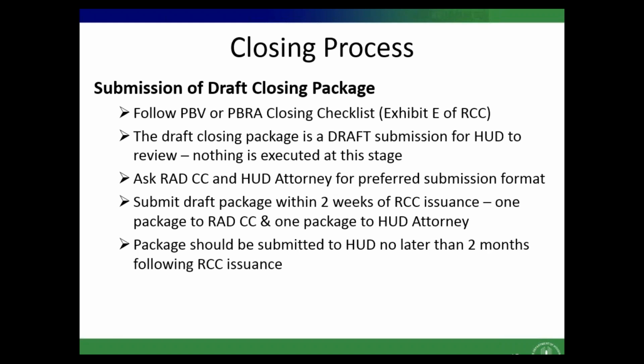to do the physical work of closing, because a lot of these documents have to be signed and notarized, and within HUD itself there could be 2 different signatures we need, or 3, or 4, depending on the exact specifics of the transaction. So if you put all those 2s together, it comes out to 8 weeks. And very few of our deals right now are closing within 8 weeks, but that really is our goal, and I would hope that you would also try to meet that.